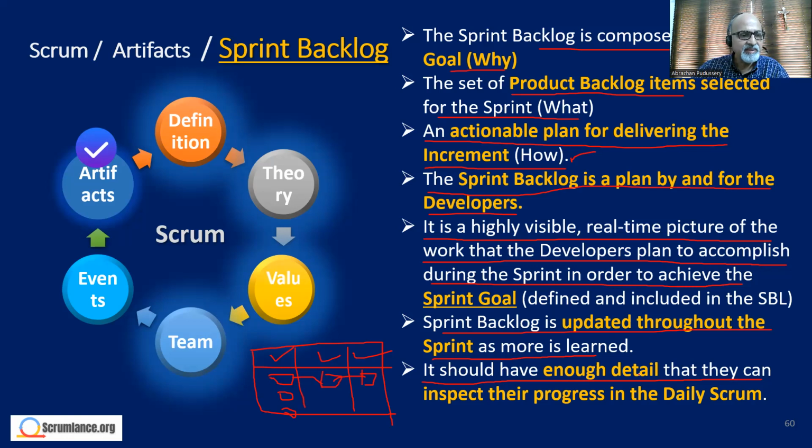User stories will have enough detail, because typically they have a header of the feature to be developed. Then a detailed body which explains what the feature is and what must be accomplished by it, and then a section for conversations.